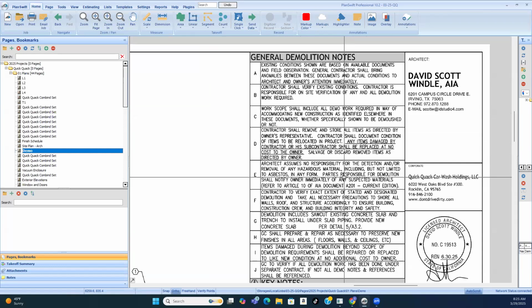When you are doing an initial assessment, usually this is how the process goes: you bid on a project, you win it, and then they say come do a site visit. Typically in commercial, you don't get a site visit beforehand. Some GCs have their stuff together to where they will try to do at least one before they expect your estimate, but most don't.